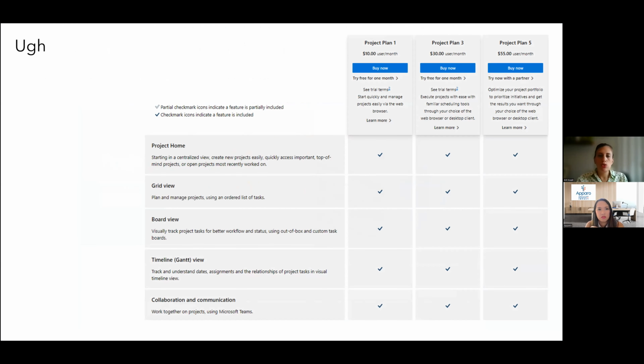It does allow you to do task aggregation, timeline view. So it's essentially Microsoft Project, like the application, but online. That's what I meant to say. It's like Microsoft Project online. So you can do much more robust scheduling. You can do dependencies. You can do effort management. You can do budget management. You can do resource allocation with it. You can look across multiple projects, depending on your level of access, and you can control access more at a task level. So all of those more enhanced features you can get with this Microsoft Project for the web.